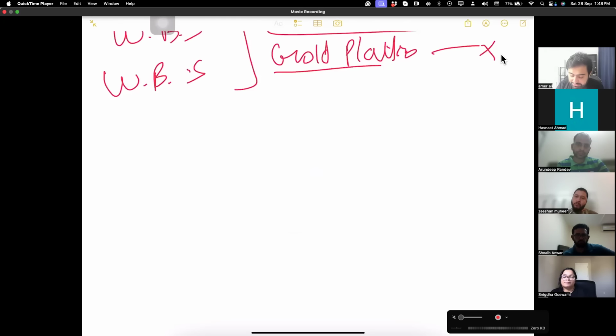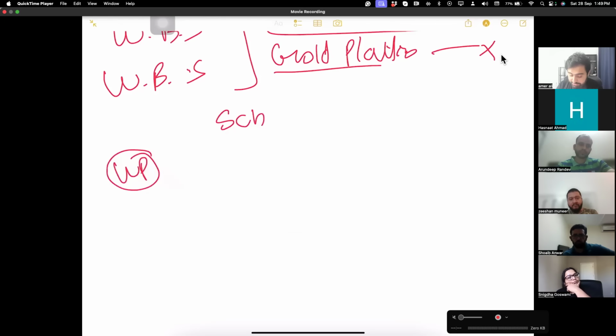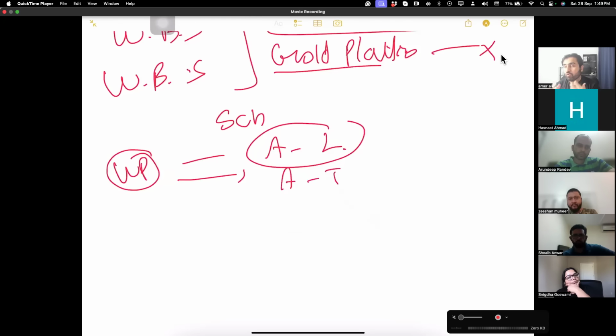Once your scope baseline is done, using the schedule management plan we decompose the work package further. We get the activity list, activities A, B, C, and activity attributes that define what the relationships and dependencies are. There are 4 kinds of dependencies: internal, external, mandatory, and discretionary. And what are the milestones here? You divide the work package, and you get it.